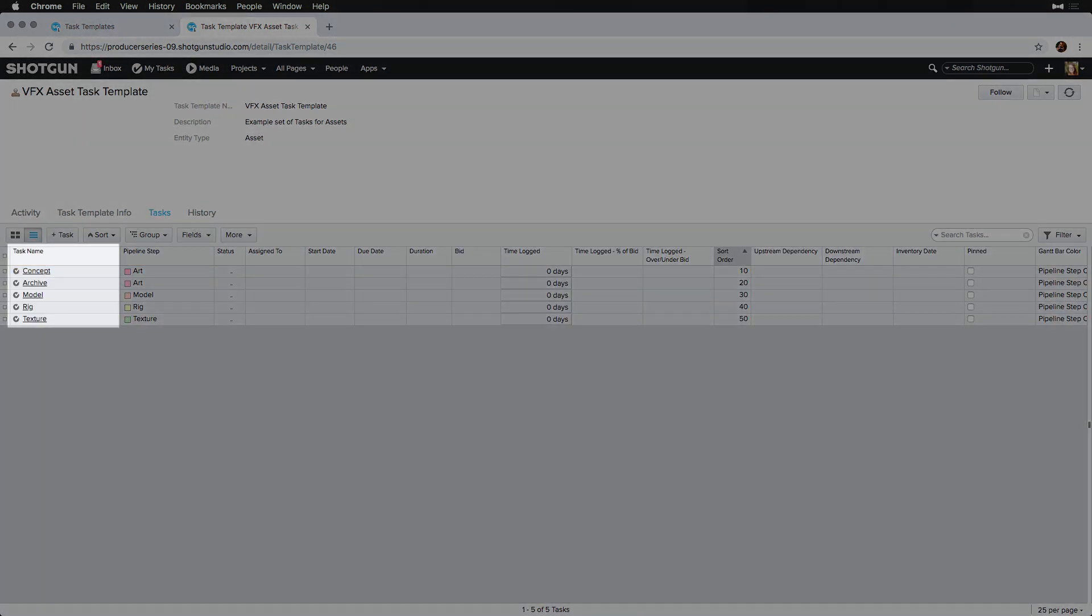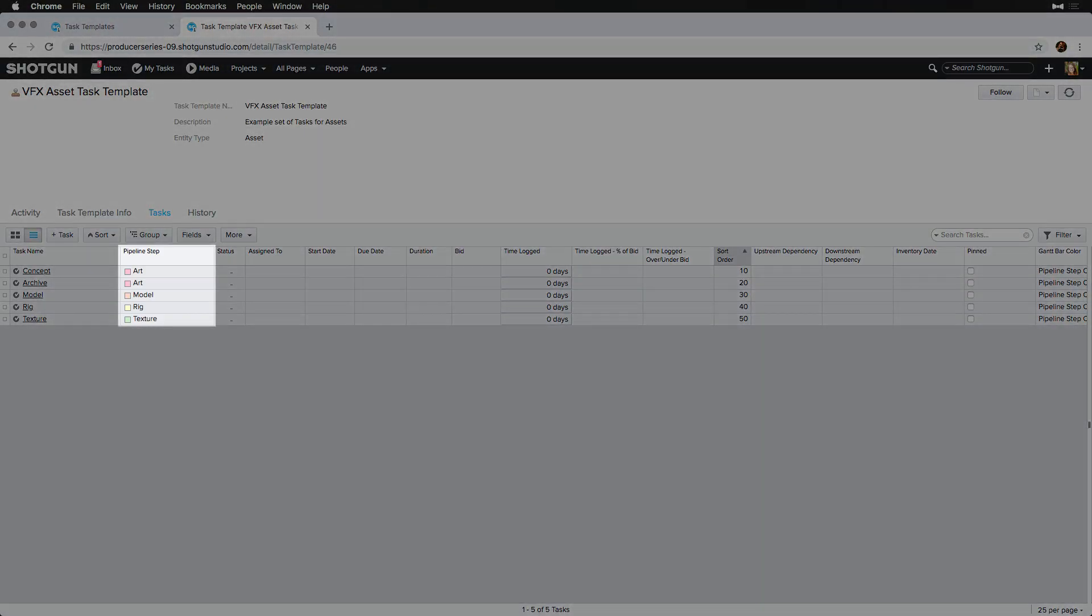The task name can be a brief description of the to-do. A pipeline step is like a department. There can be many tasks within one pipeline step. For instance, we have two tasks listed in the art pipeline step, concept and archive. These are the two to-dos that need to happen from our art department before modeling can start.